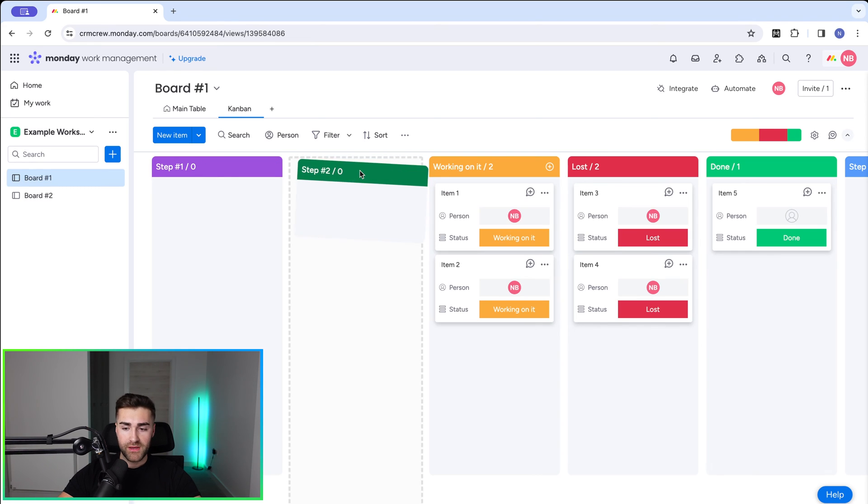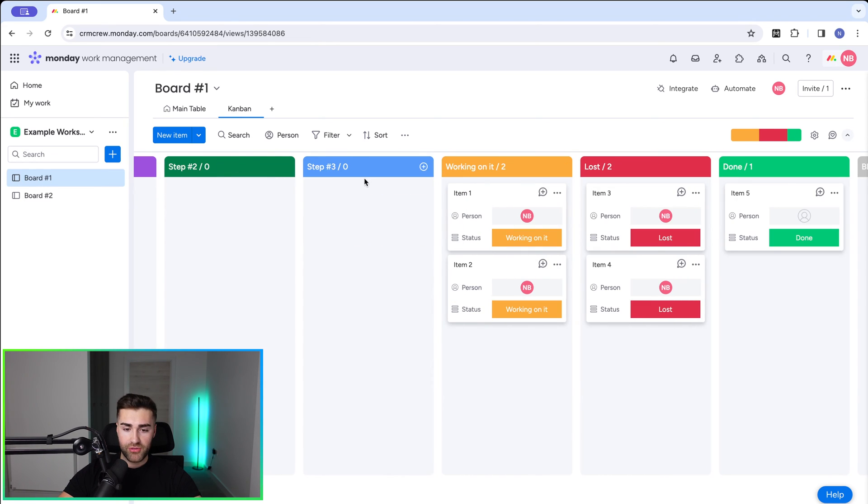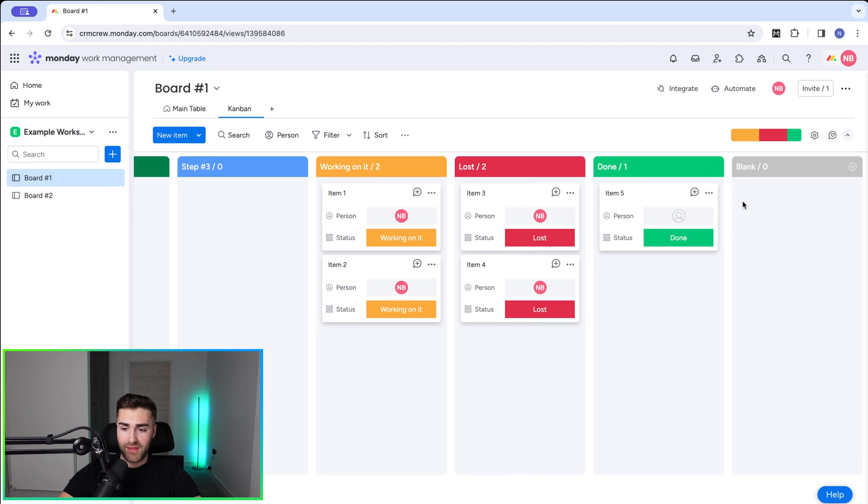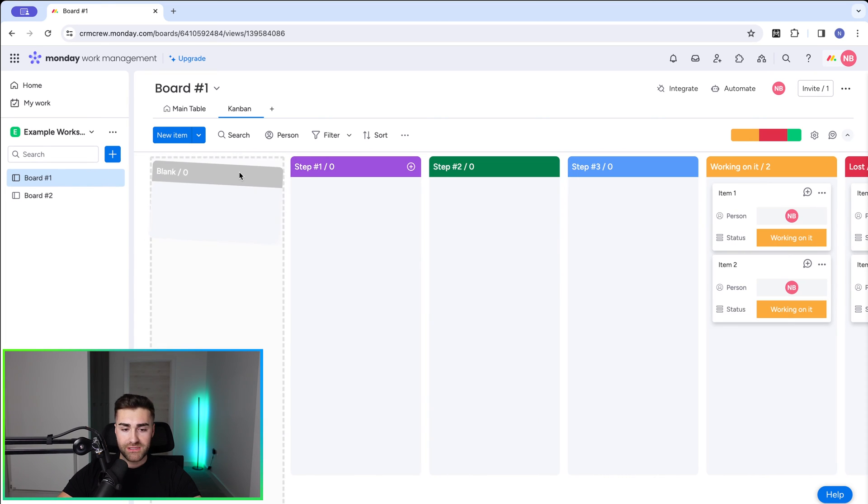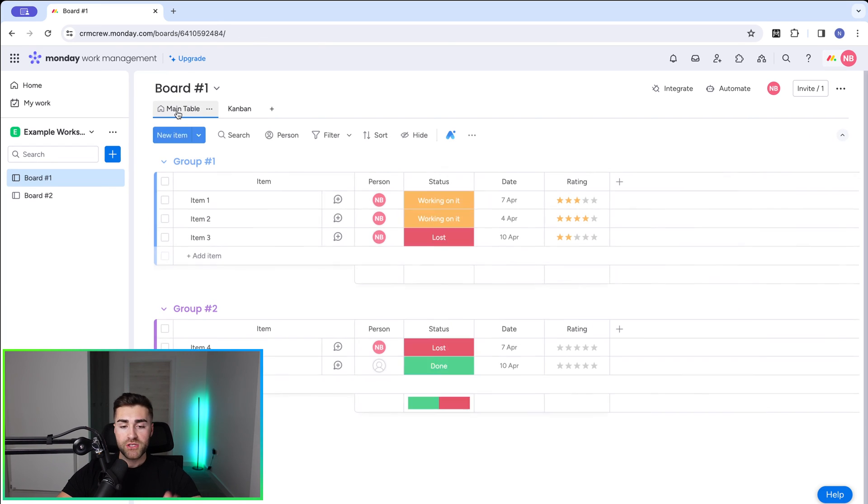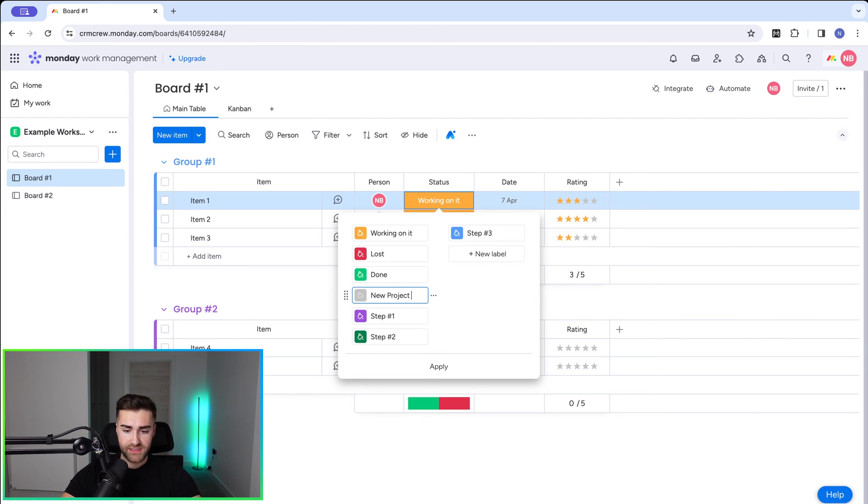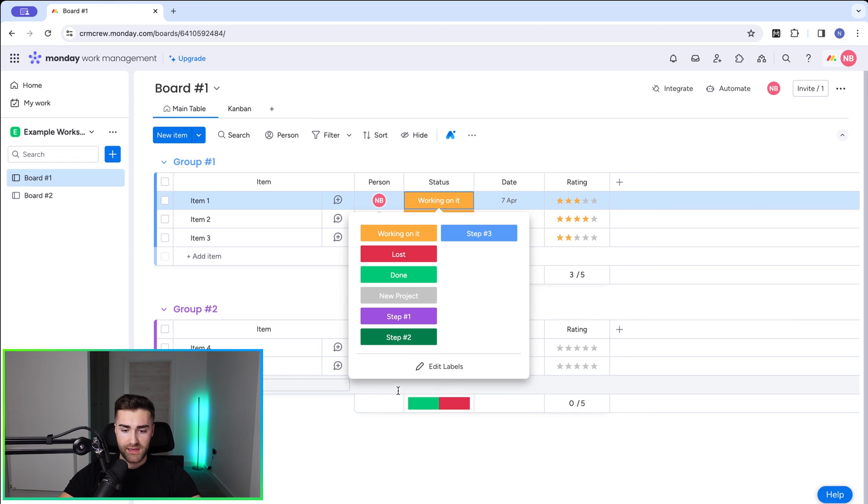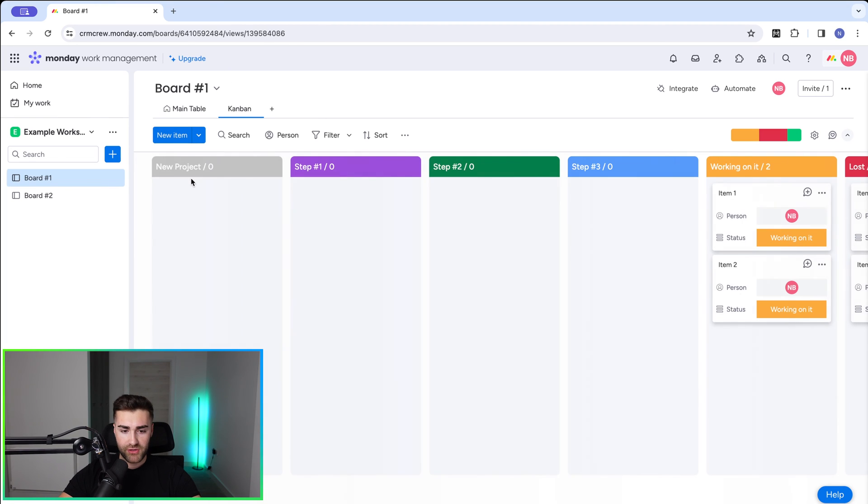So step one, then step two, then step three. And then we can go ahead working on it, lost, done, whatever you like. Do bear in mind that for every status column, there is a blank option. And that is default. There's nothing we can do about that. So I would strongly recommend utilizing it. So if we were using this for a project, I would put new project and press apply.